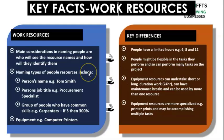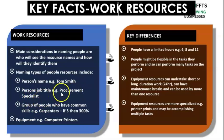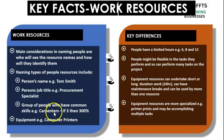Let's look at some other key facts about work resources. One of the main considerations in naming people is who will see the resource names and how will they identify them. There are three ways of naming people in this project, and we are applying this same way to Excel. You can use the name, for example Tom Smith; you can use the position, for example procurement specialist; or you can use categories of people — groups, like carpenters, laborers, or masons. It may not make sense to call each by their name, so if you see 300% in terms of availability, it means there are three people.